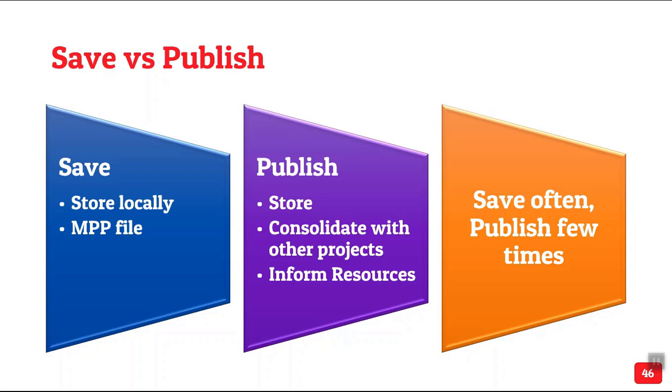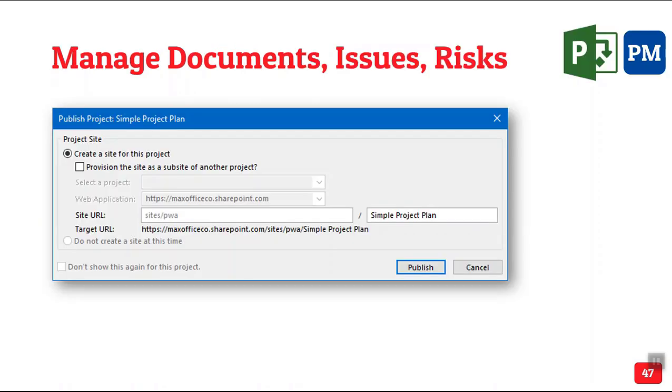Now, how often do you publish? As a project manager, you may be tweaking the project. That time you don't publish, you just save. When it is finalized, any major update, then you publish so people get informed.